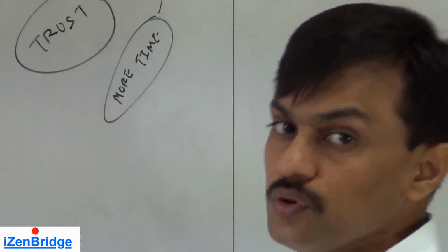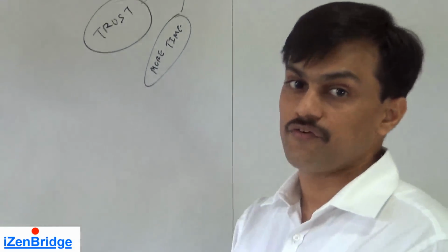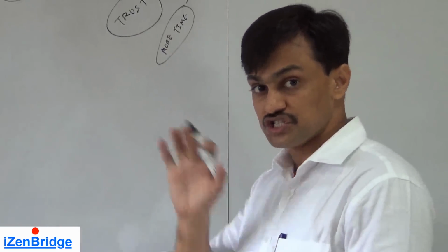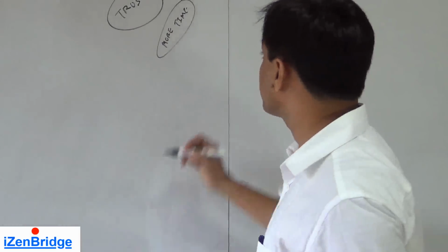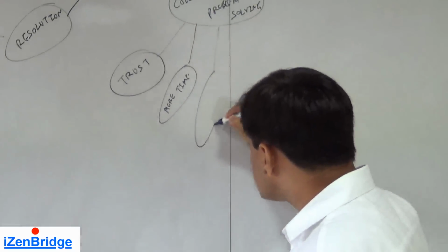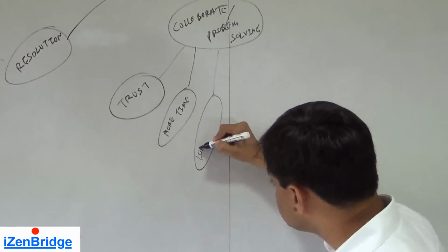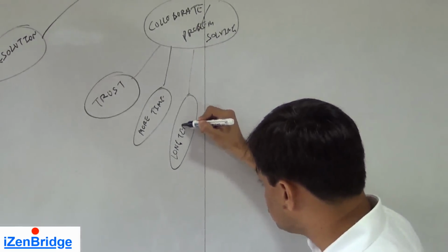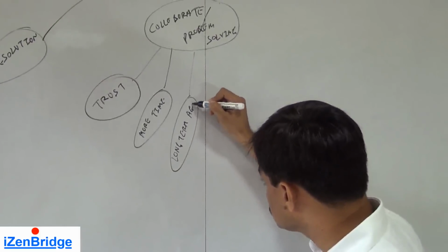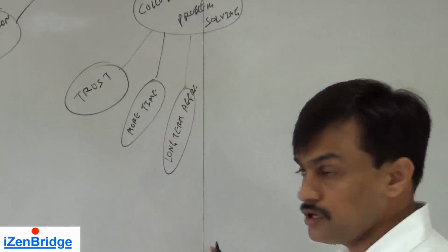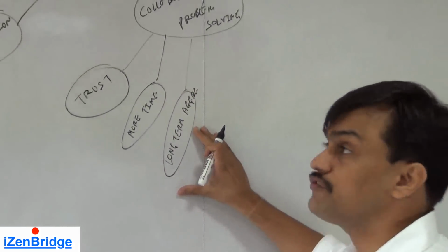Since you need to do an analysis, you need to identify the underlying reason for the approach or the stand which both the teams are taking. It generates a sustainable agreement. So it's a long-term agreement. Since we have gone into the details, whatever we agree will stay for long.